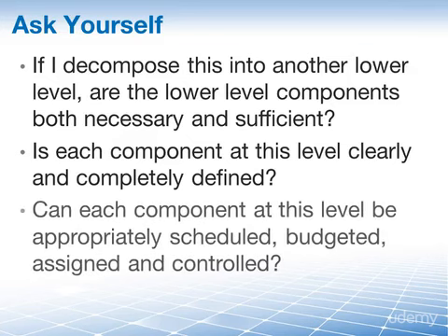And can each component at the current level be appropriately scheduled, budgeted, assigned to one of our team members, and controlled? The answers to these questions will help you decide whether to stop right now or continue decomposing further down. In the end, each work package should contain a verifiable product, service, or result.